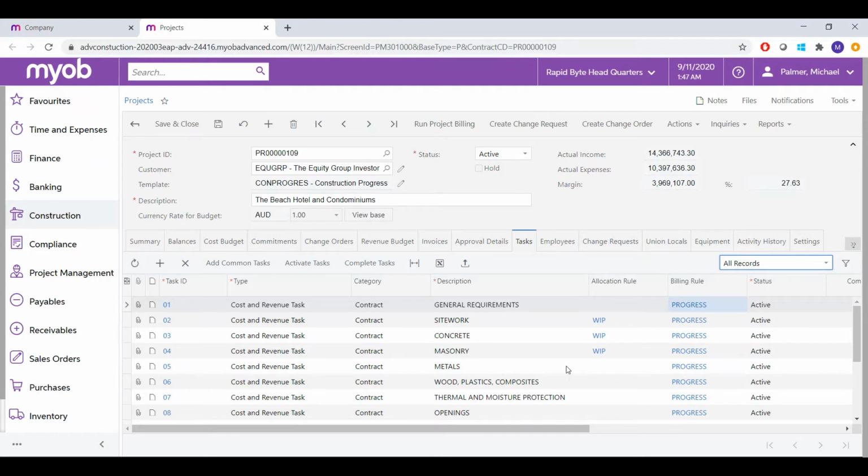But let's say for a milestone project, you can also use the different project tasks as the different milestones you bill to the customer. Or in the case of time and material projects, you can have them as the different costs that you incur, or even have just a single line where you book your costs from your labor, from your materials, and from your subcontractors too.